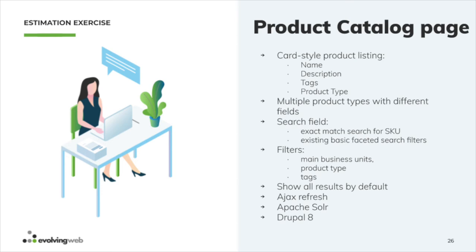105, yeah. But the thing that we should be estimating, therefore, if the client asks us for a single commitment number, is that we should have probably given a range. If they ask for a single number, which is often the case, you probably want to go to 125 to 150 for the dev, and then you start adding all of the PM, design, QA, deployment, revisions, and so on. And then you probably will tell them 200 to 300.